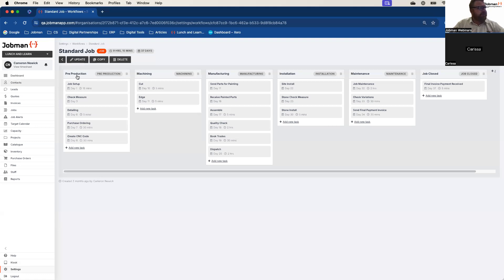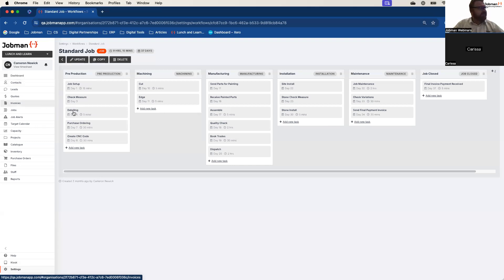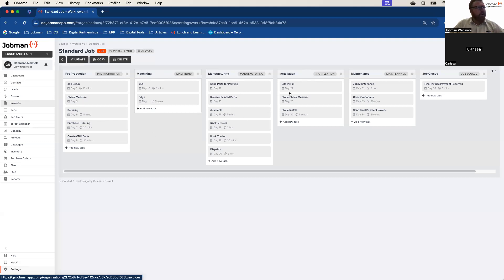This can be as complicated or as simple as you want. For most manufacturing, there will be a starting point — I've called it pre-production. You can call it whatever you like, but pre-production makes sense: this is where we do a few tasks where we're not yet manufacturing, but we've got things that need to be done before we can start manufacturing — for example, the detailing, purchase ordering and creation of CNC code. My second status is machining, which moves into manufacture, then assembly, out to my critical dates which is installation. It's a very simple flow, but it makes a lot of sense and it'll work for 90% of my jobs.